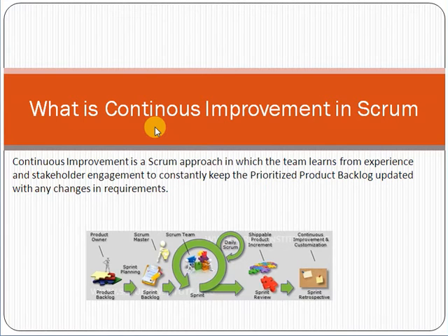If we talk about the events in Scrum, mainly there are four events or meetings. The first one is the sprint planning meeting. In this meeting, people discuss, for example, the product backlog, which is the complete set of requirements. From the product backlog, the team decides that we will take these requirements for the sprint and deliver them to the customer. So this is the sprint planning meeting.